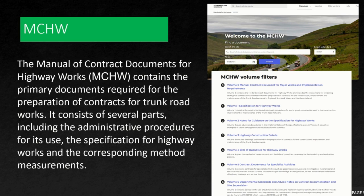Volume 1 is very important — it contains series starting from Series 0, Series 100, 200, 300, where each series relates to a specific document. Volume 4 covers bill of quantities and construction details, and Volume 5 covers contract documents for specialist activities. Each volume contains different types of documents.